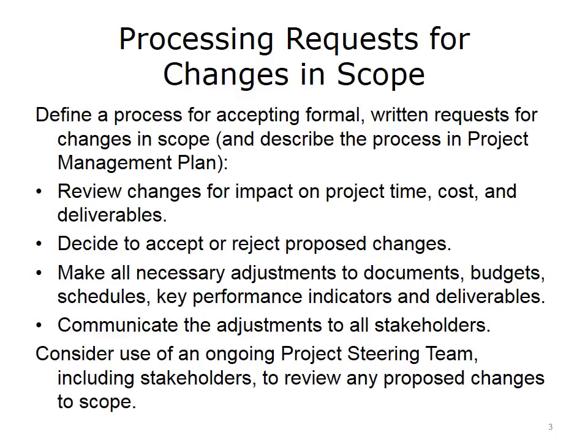Consider this classic example of how a simple one-sentence change can have tremendous implications. Suppose a change request stated, any user could negate any change he or she had made during any interactive session. This simple one-sentence change might sound harmless, but there are tremendous implications for any system to accept the ability for users to undo any previous actions. This is often extremely difficult to implement.